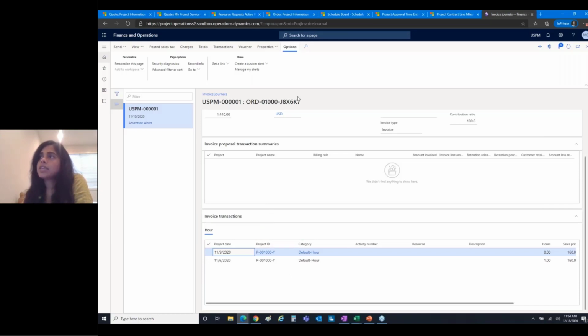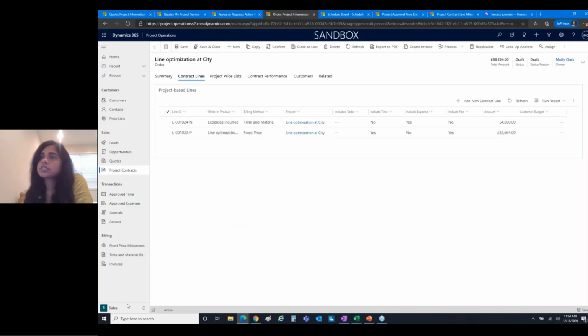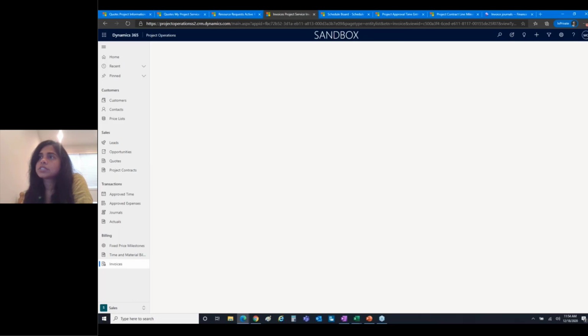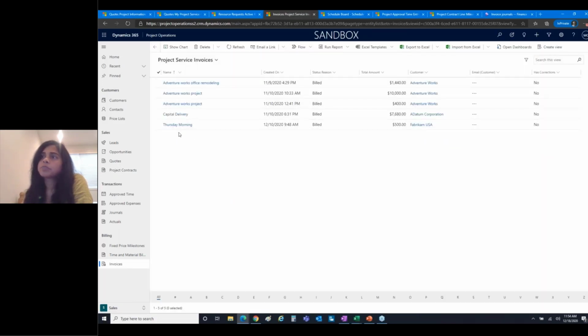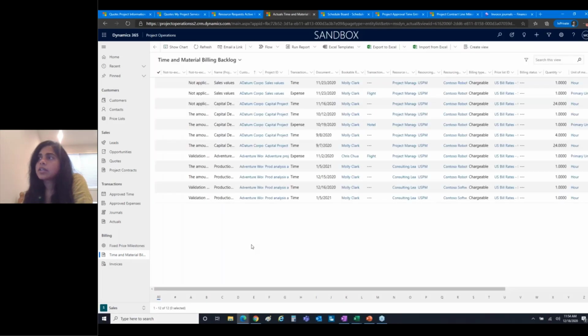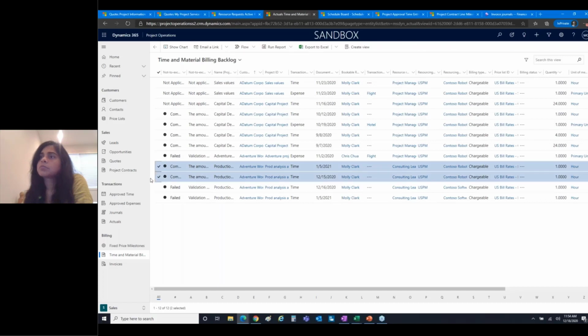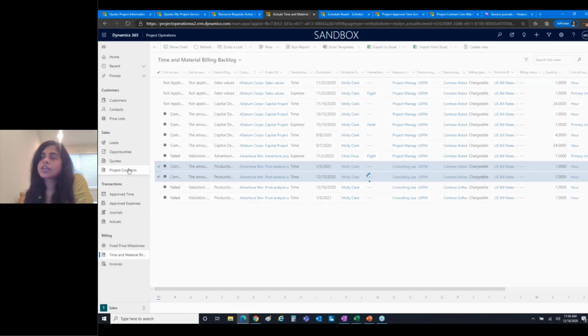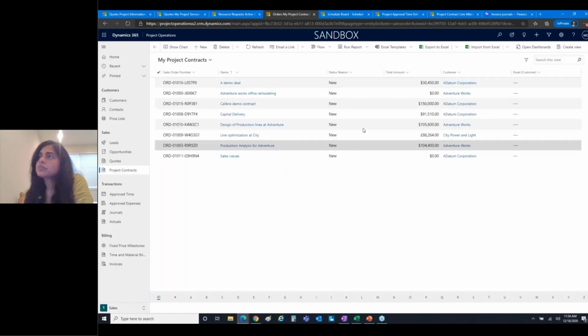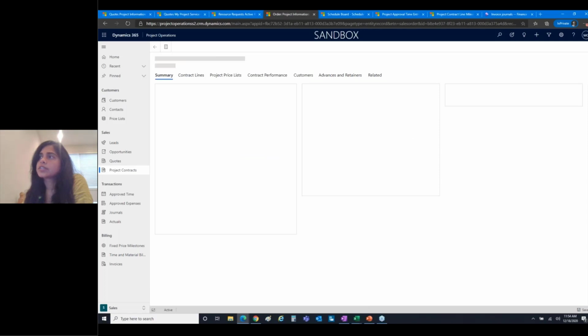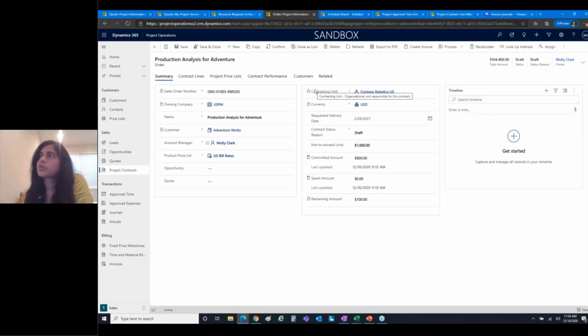But also as a PM, I can look to see what invoices are available. If I go back to my T&M billing backlog, I see some that are committed, that is, they did not fail the not to exceed validation, so I can mark them as ready to invoice. And then I could go to my project contract and then go to the specific contract here, where I have this billing backlog approved for invoicing, and I can elect to create an invoice.